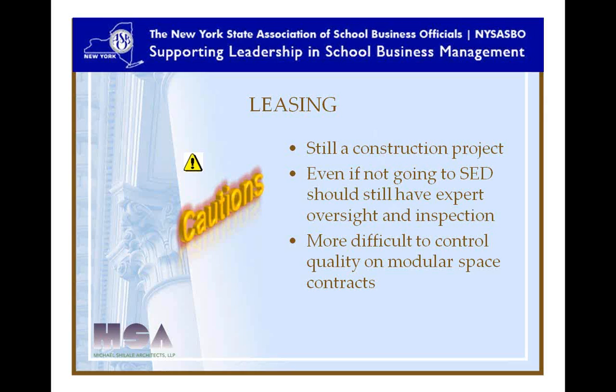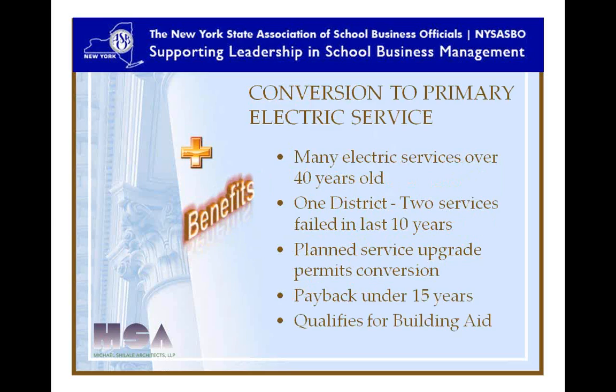use some of their standard specifications. That's where the savings are, and that they build these things every day, and there's some economies of scale. So the more standardized material systems and equipment that goes into your modular project, the greater your savings are going to be, and that's something to try to maximize.